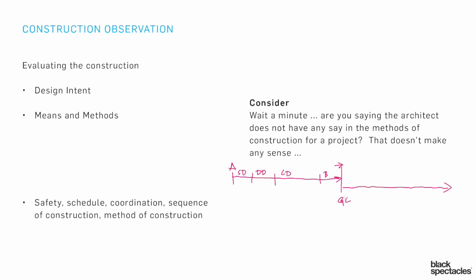Even though you've been talking about those means and methods issues, at this point there's going to be a big change. Now that's all in the general contractor's purview and not in your purview. You still have a role in the discussion — you're still there to help the general contractor understand the issues, and you still have your structural engineers, mechanical engineers, and other consultants as part of the discussion. They are now responsible; it's in their control, and they are asking for that additional information. You're supplying the information when asked, but they are in control.